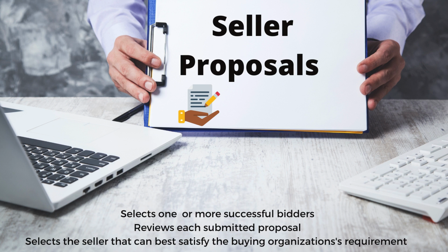Seller proposals are prepared in response to a bid document package containing the basic information that will be used by an evaluation body to select one or more successful sellers, also known as bidders. The evaluation body reviews each submitted proposal according to the source selection criteria and selects the seller that can best satisfy the buying organization's requirements.